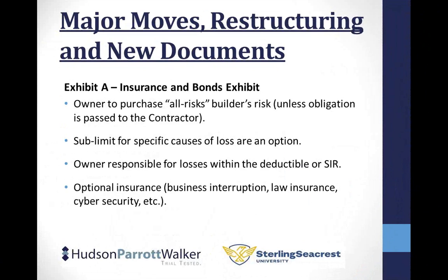And there's really some key language in this document that I think is germane to that decision point, because there's a waiver of subrogation in the agreement, and that continues to be in the general conditions, and it's pretty similar to the current version. But one of the things that paragraph says is that we waive subrogation against each other to the extent that the damages were caused and are covered. I mean, the damages are covered under the builder's risk program.